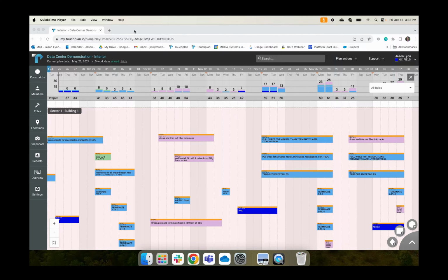The number at the top of the colored bars will indicate the total crew size or manpower count required for this particular day for that particular project. The number below will show you the number of people that need to be on site that day for the entire project across all of your plans.